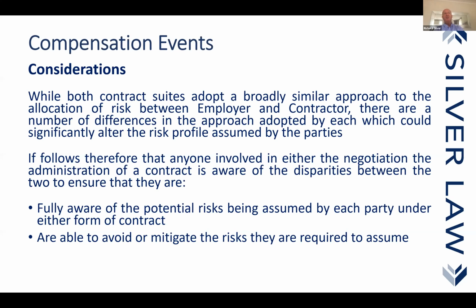Misrepresentation is a non-contractual action. It's a tortious action where a party has a duty of care to the other party when providing certain information, but it has to be read in all the circumstances. So where an employer issues a SAW report, which is not a contract document, as part of the tender documents, in pricing, the contractor takes it into account. And if it's proved to be wrong, there's a misrepresentation, which the contractor may have an entitlement.